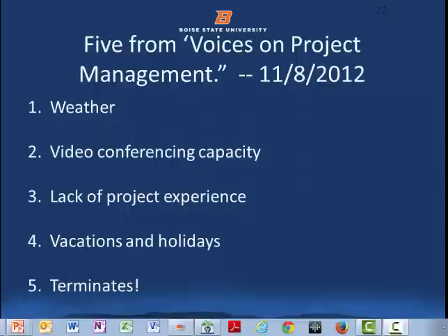This is from a 2012 conference, Voices on Project Management. And these are things that people actually talked about that were on their project and they really forgot to take a good look at. Weather. Boy, if you're building something or you're traveling or looking at something, weather could be an issue. Video conferencing. We all assume the technology is there for everything. Lack of project experience. Everyone thinks they can do it, but do you really have the experience? And vacations and holidays. We think that everybody's going to work for 300 days straight, when people do take vacation and holidays. That happens, and you have to understand that and plan for it.